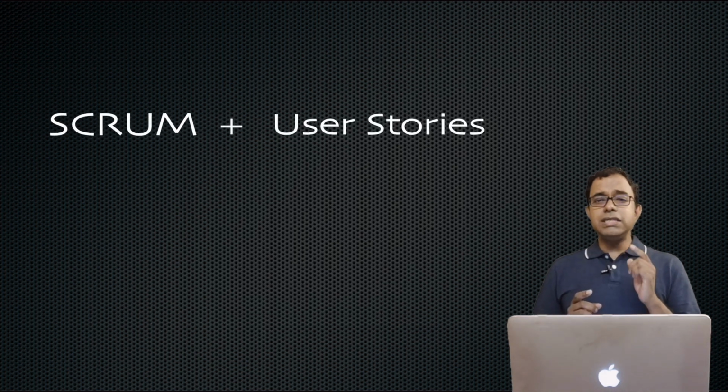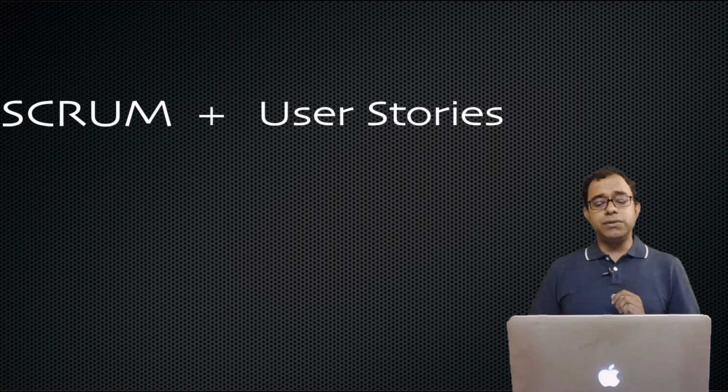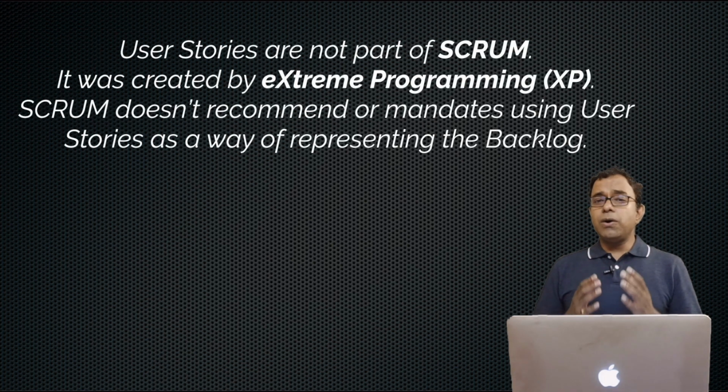Now, if you are using Scrum and using user stories, here is something very important you should know. User stories are not part of Scrum. Yes, you have heard it right. User stories are not part of Scrum. They were created by Extreme Programming, XP, more than 20 years back, but they are being adopted in Scrum to depict sprint and product backlog. It is not Scrum, not part of Scrum. Scrum by itself, as per the Scrum guide, doesn't mandate the usage of user stories as a requirement representation.